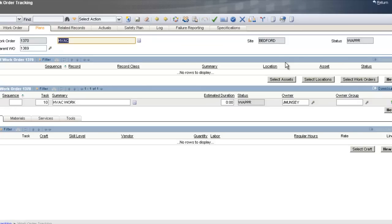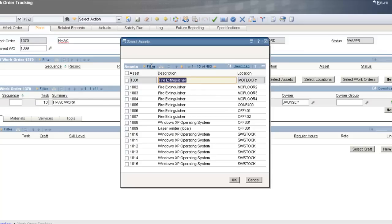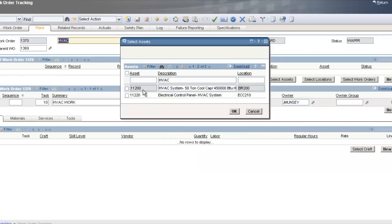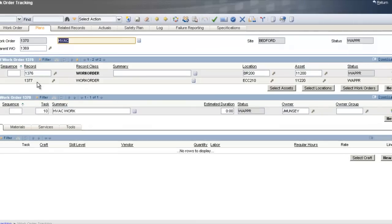There are multiple ways to do this. I'll click on Select Assets, filter the list for everything with HVAC in the description, and there are two items with HVAC. I can select both of them, and I've just created two more work orders as child work orders of my overall HVAC department work order.